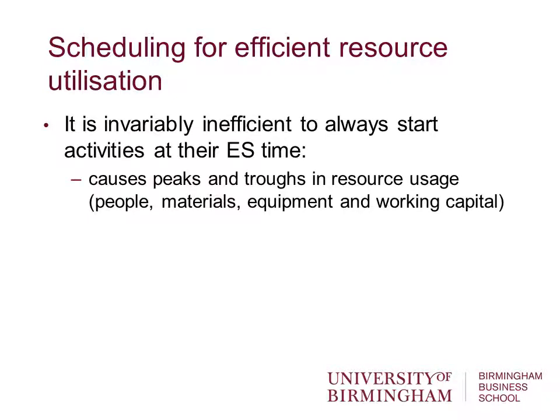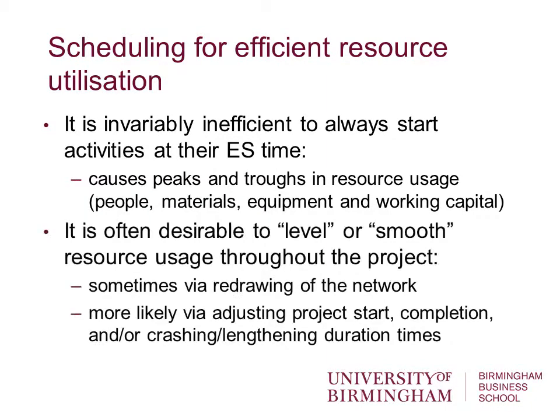Okay, it's invariably inefficient to start activities at their earliest start time because we have peaks and troughs, as we've seen in resource usage. So we usually shift activities around in the planning stage to smooth and level those resource usages. It's often desirable to level or smooth the resource usage throughout the project, sometimes via redrawing the network, more likely via adjusting project start times, completion times, and or crashing or lengthening duration times. And I'll talk about crashing in a moment.